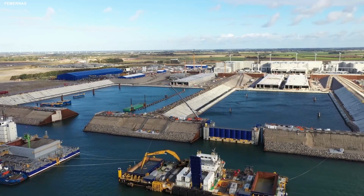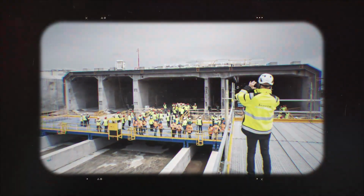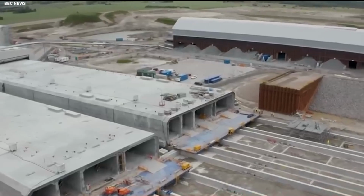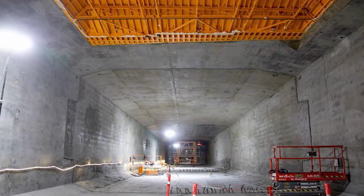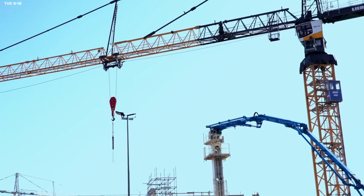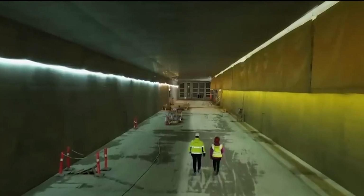But megaprojects are never clean, simple stories. They carry engineering risk, cost pressure, political scrutiny, and the constant possibility that one delayed stage can ripple through the entire schedule. In January 2026, Fehmarn AS said the first tunnel element was expected to be immersed in spring 2026, but also stated that delays in immersion made a 2029 opening no longer realistic, with a new overall schedule to be prepared after the first elements are immersed.